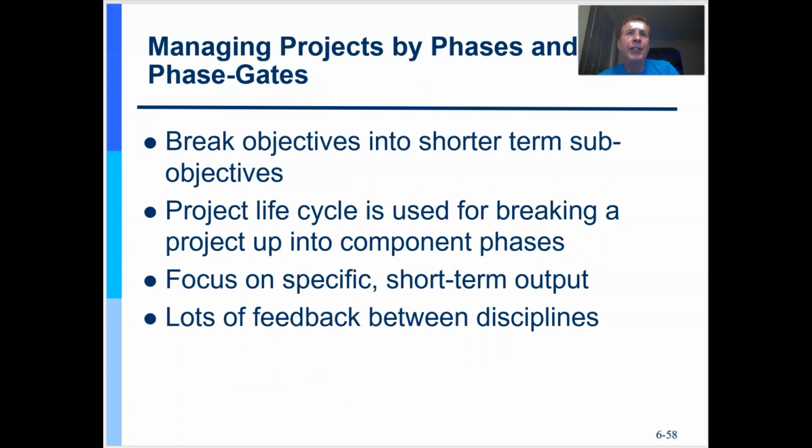And you're going to manage all of this work by phases and phase gates. So for each project, you'll develop your phases. It might be a strategy phase, then a design phase, and then a build phase, and a test phase, and a rollout phase, right? Whatever you want to call it. And at the end of each phase, you'll do a phase gate, which is, did I complete all of my requirements enough that I can move on? It's a phase gate. It's a go, no-go decision.